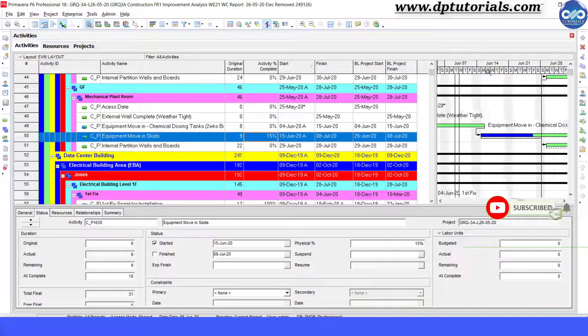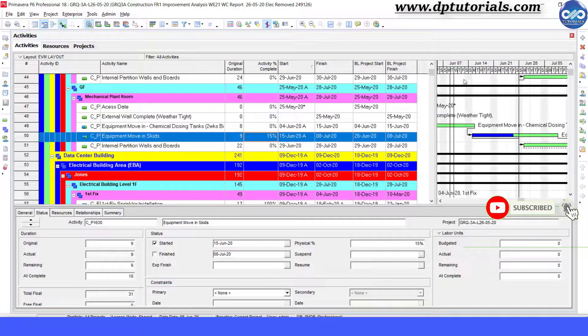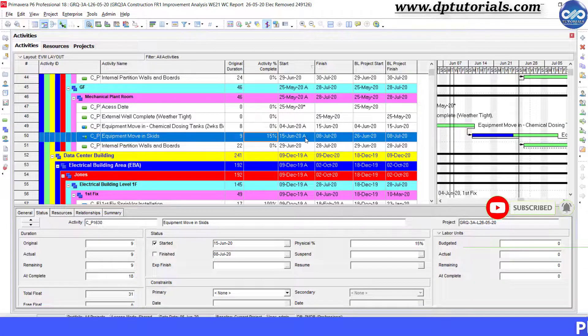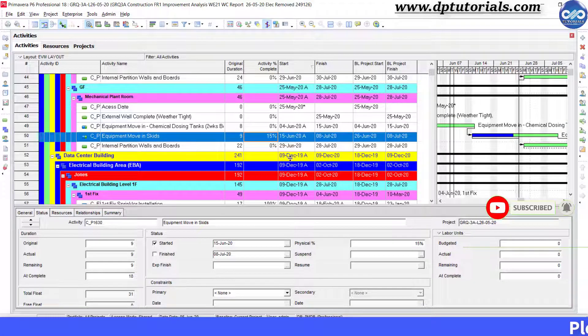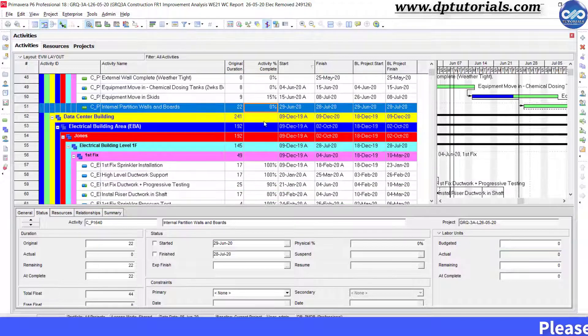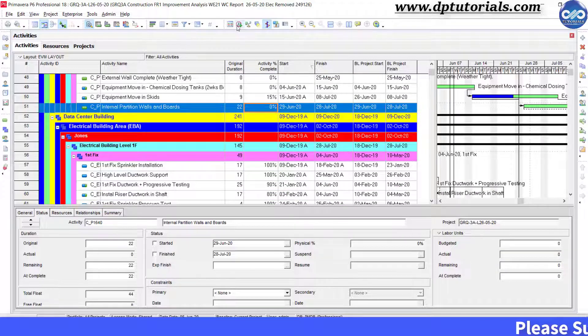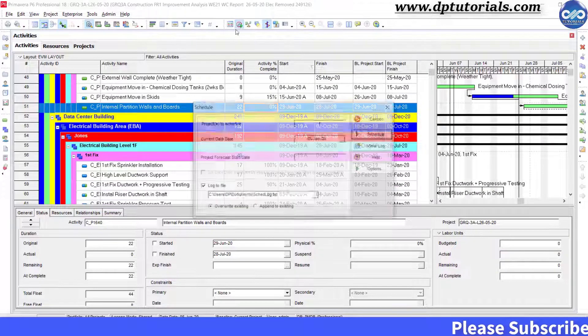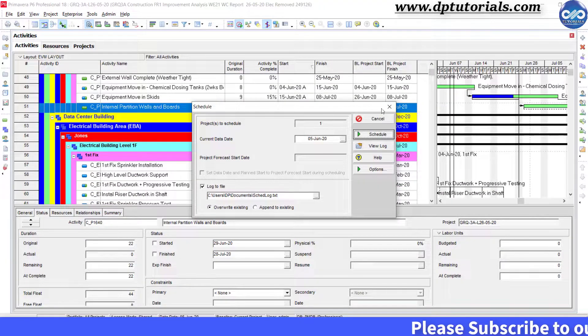Okay friends, in this way you need to update all the activities manually, and then schedule the project to see the overall impact and compare this with the baseline plan.